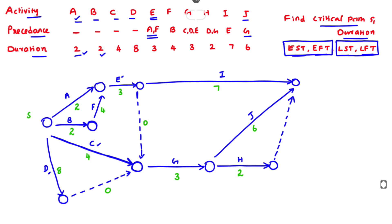Now we identify all paths in the network. Path A–E–I: duration = 2 + 3 + 7 = 12 days. Next path is A–E–G–J.